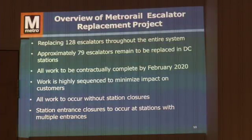Yes. Again, what we've experienced in the past when it comes to the weather is just the high winds. Not having the crane in operation for that evening, to be able to pick and hoist and then drop off the trusses.